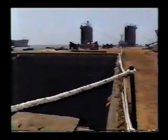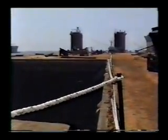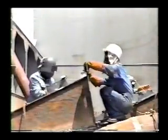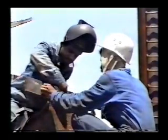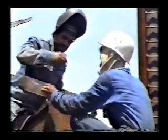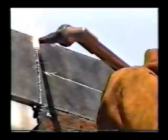Before the stricken frigate could be loaded on board Weissmuller's Mighty Servant II, the deck of the heavy lift transporter had to be carefully prepared. At the harbor of Dubai, dunnage had to be welded on deck to support the keel of the Samuel B. Roberts, a very accurate job because of the frigate's complex hull shape.